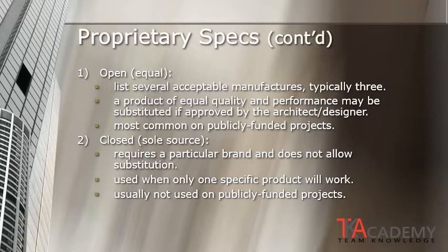This method is the most commonly used method on publicly funded projects where the government does not want to be seen as showing biased favoritism toward any one manufacturer. They want to open it up some to allow for competition, but also be able to control the quality of products and manufacturers that are going into the project.